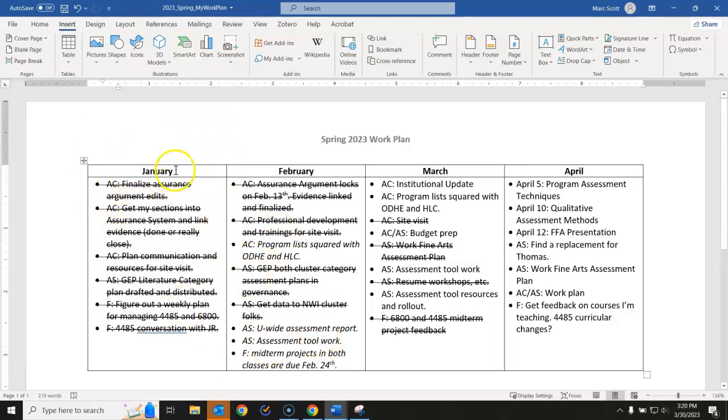So, for you all in August or over the summer of 2023, here are the different things that I'll be working on in relationship to my project. And that's not where I would begin. I would begin at the end, with commencement. You're walking across that stage. Leading up to that, what needs to happen? Well, you read the guidelines that Dr. Jen Scott has sent out, like when things need to happen, and you backwards plan from that.